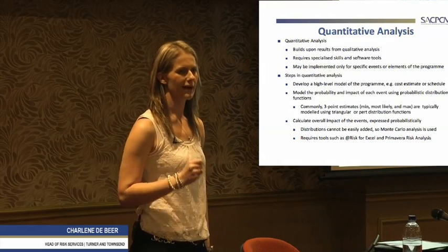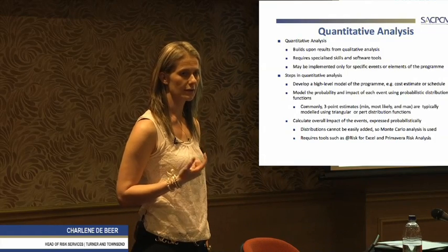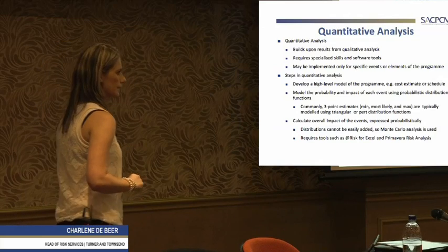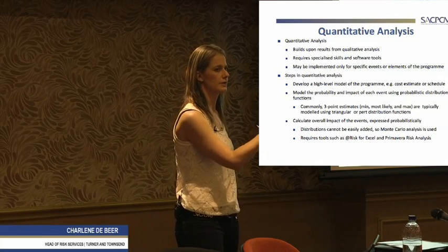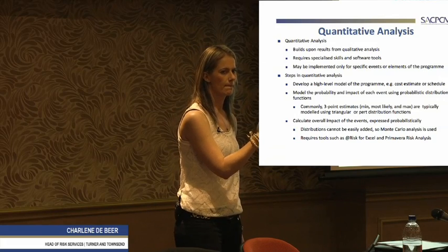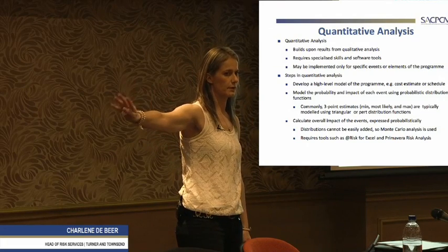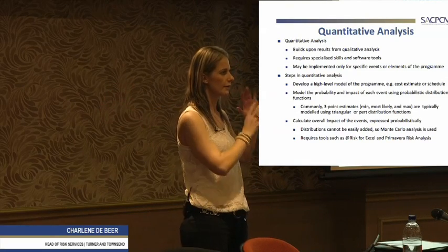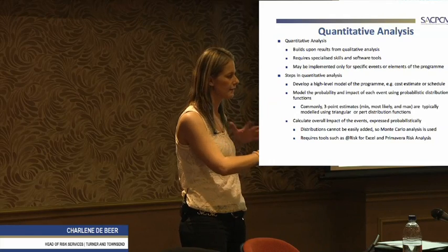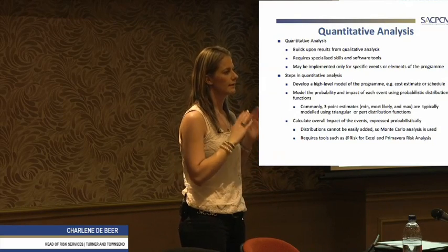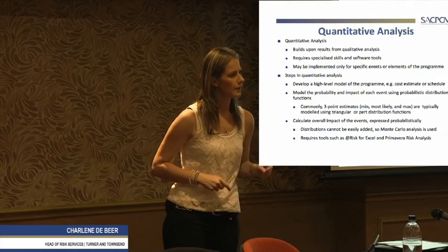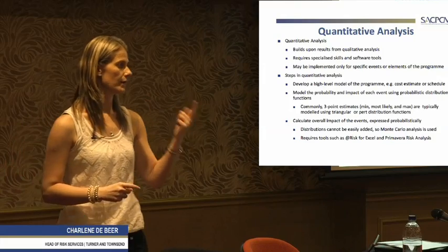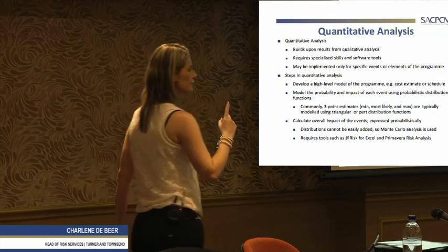Because people would always say, but how do you cost schedule? And it's very interesting. If I had to choose, I'll always use a schedule risk register. Because what it does is it gives me schedule impact and it gives me cost. Schedule analysis we do in Pertmaster and Primavera Risk Analysis, which I'll explain how we do. But if we solely look at a risk register in which we've identified likelihood, etc., if you could assign time to it, because time is money, it will be very beneficial, because then you'll have time and cost impact in one risk register.